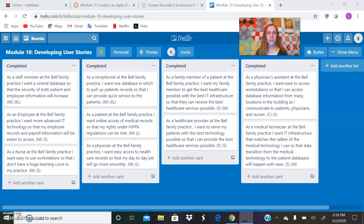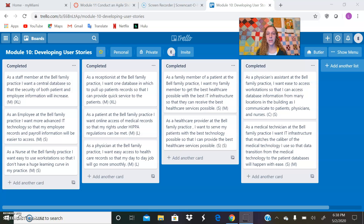Hypothetically speaking, at the beginning of this project, I used an Agile technique called a success slider, in which me and the client determined that the time for this project is very fixed, so it's correlated with the finishing up of this class at the end of this semester.